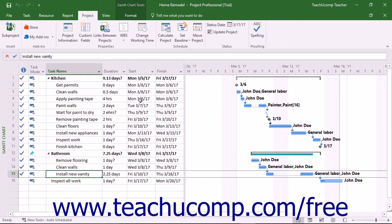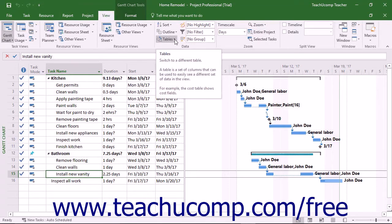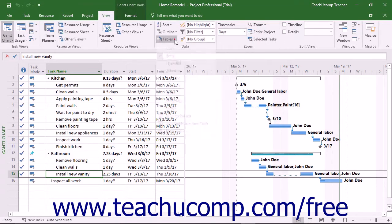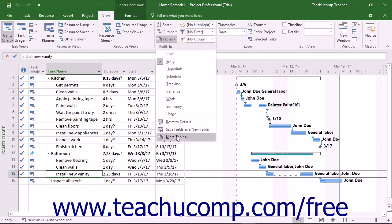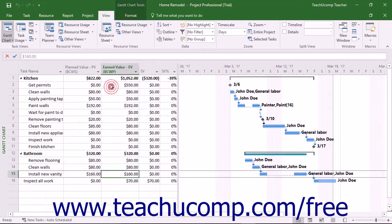After accomplishing these tasks, you can easily view the earned value schedule indicators for the project by clicking the Tables button that appears in the Data button group on the View tab in the ribbon, and then choosing the More Tables command from the dropdown menu. In the More Tables dialog box that appears, select the Earned Value Schedule Indicators choice and click the Apply button to see the values in the Gantt Chart view.